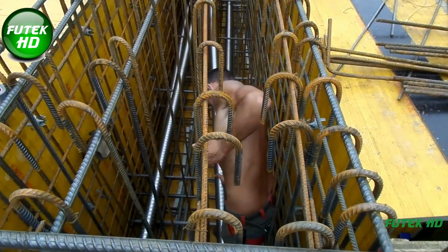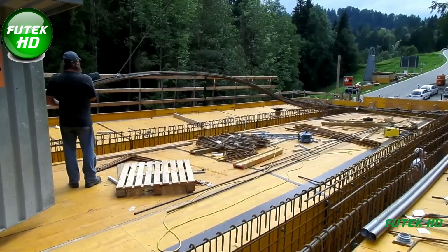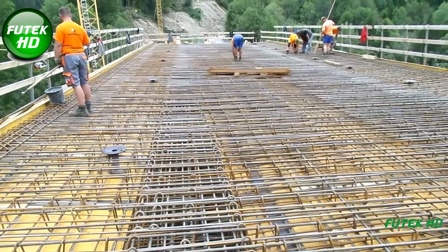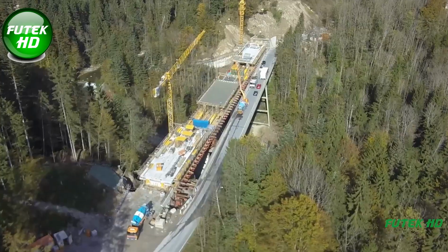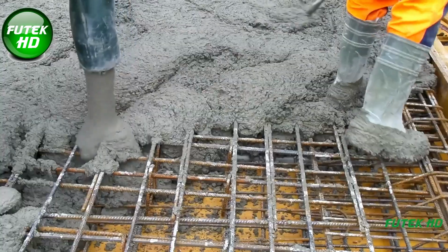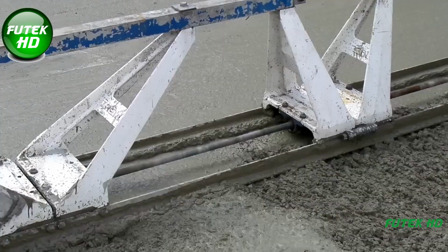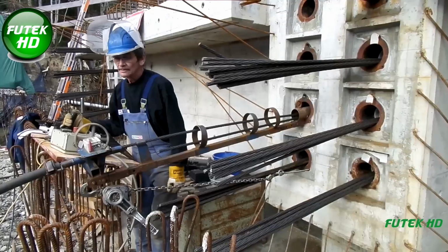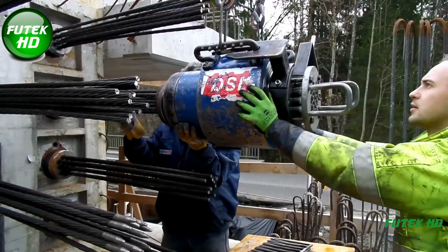With the bridge deck in place, pre-stressing cables were installed and tensioned in segments. Each of the 16 cable bundles was tensioned to a force of 230 tons, creating a total elongation of up to 75 centimeters per cable bundle. This pre-stressing method not only reinforced the bridge structure, but also provided flexibility under heavy loads, extending the bridge's operational lifespan. Following the cable installation, grouting material was injected to lock the cables in place and ensure a firm bond with the surrounding concrete. As the primary structure neared completion, work on the bridge's drainage and surfacing began.